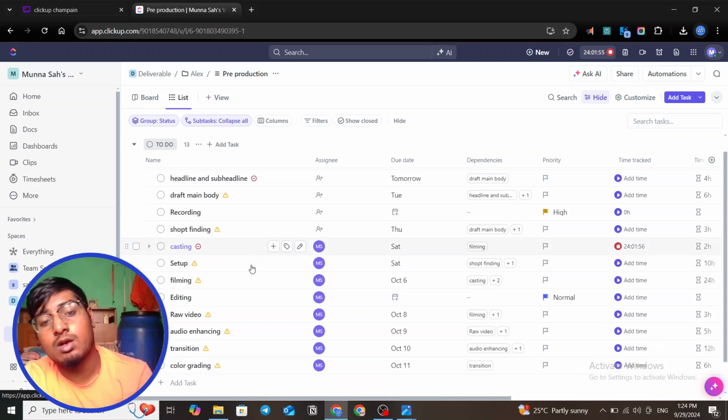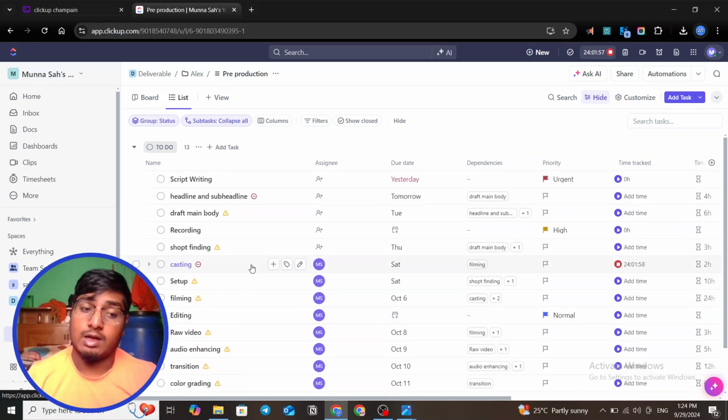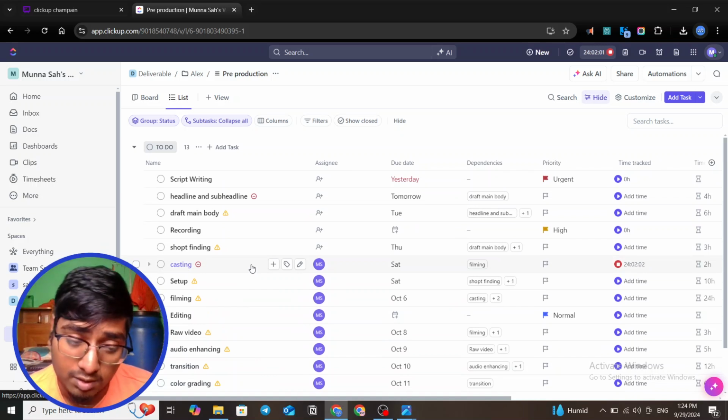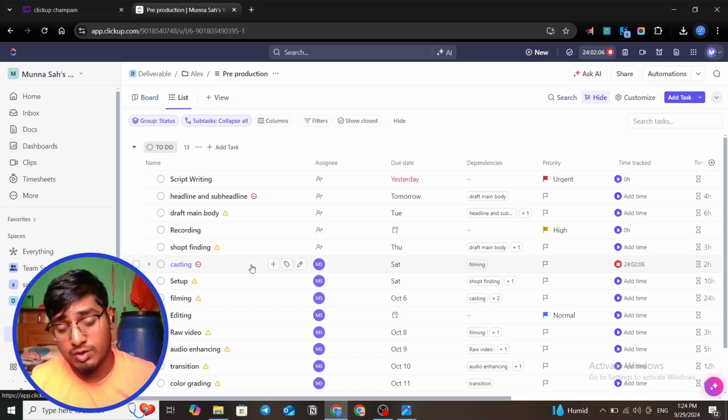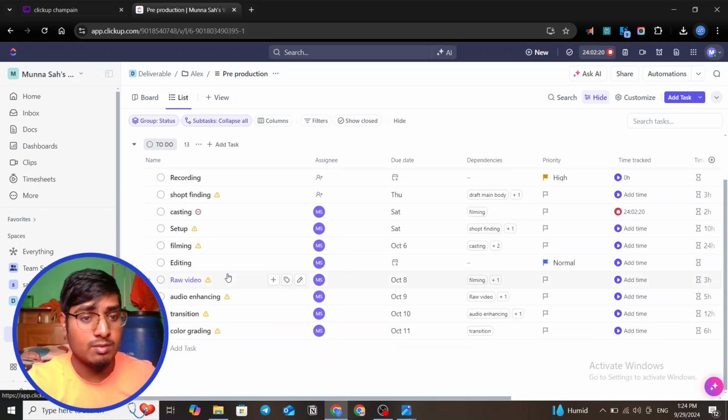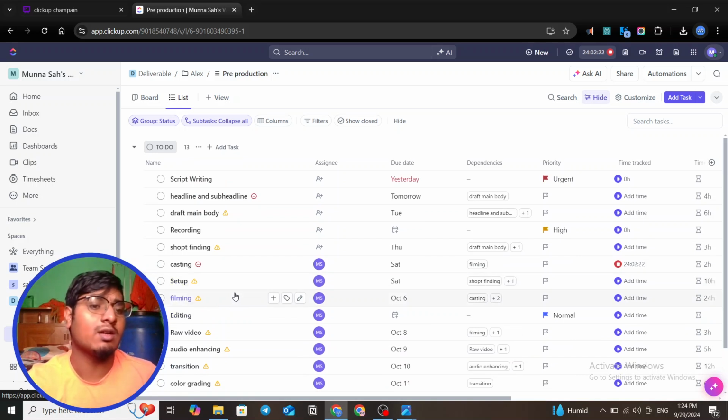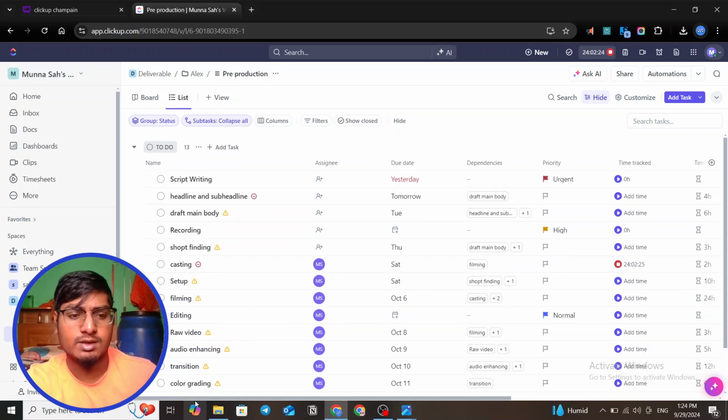A list can be a big or small activity or project. How big it should be depends on the client life cycle. How much time does it require to produce the product or deliver the service? Is it 5 days, 10 days, 15 days, months? The shorter the time, the less complex the list should be.